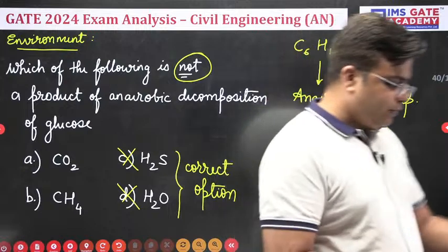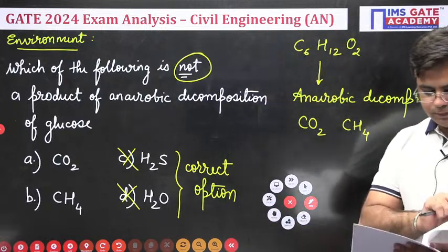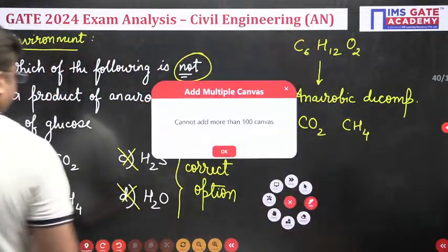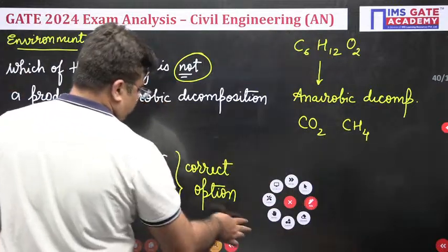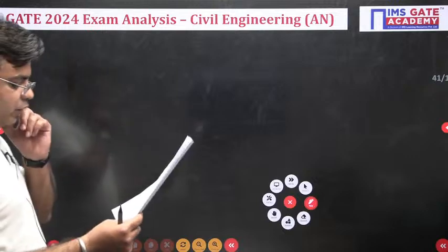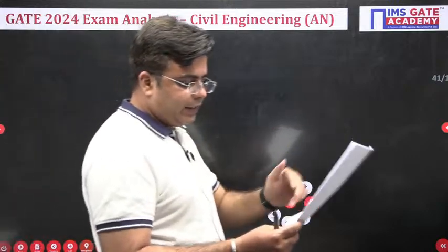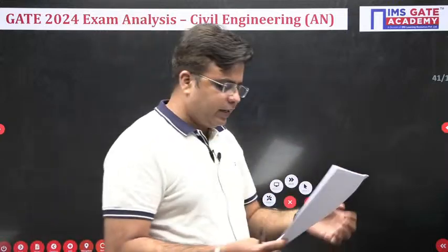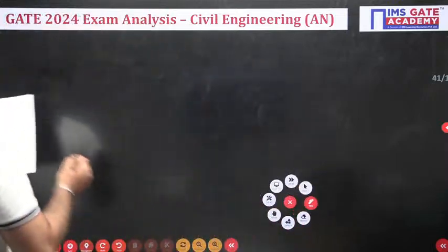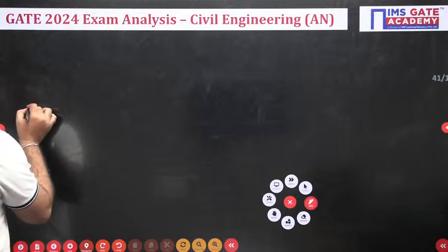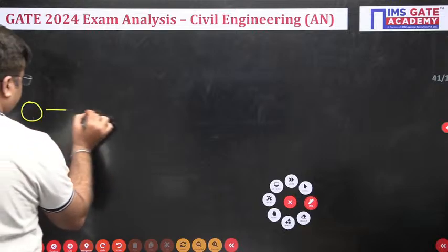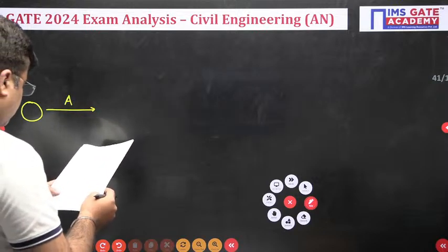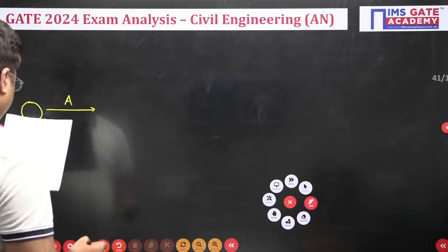Okay. Now next we have this PERT question. In this CPM question, the precedence relation is given to you. So you have different activities, duration and precedence relation is given to you. So I will directly draw the network diagram. This is my activity A, which is the starting activity. Then this activity A is followed by 3 activities B, F and K.